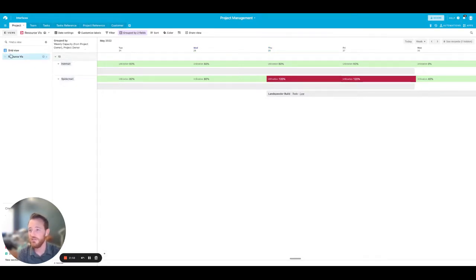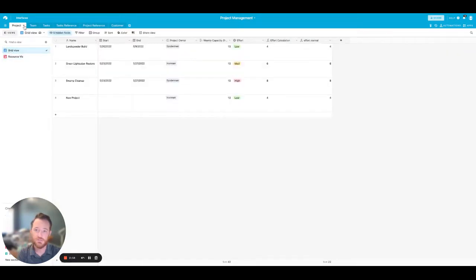So as I mentioned, you're going to need two tabs, and you're going to want to have your projects tab and everything about your projects in this table. For the example, you need to have a start and end date. So drop those in as date fields. You're going to want to create a linked record field here for linking to the team table for who's on the project so that you can assign who is the project owner.